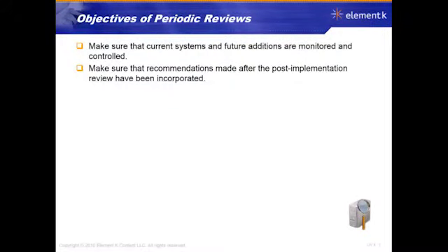How about the change control? Was that done effectively and appropriately? And when we did come up with recommendations from the post-deployment review, have they been implemented? So these are things that we need to periodically check. How often? Well, it kind of depends. At least once a year, maybe every 6 months if you can, if you're really lucky every quarter, but that's probably not very likely. So we have to periodically review how well this new thing is working.